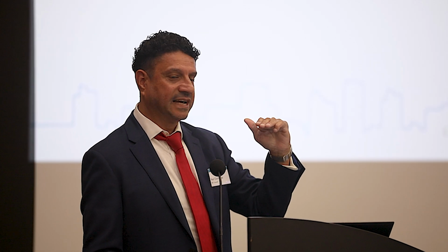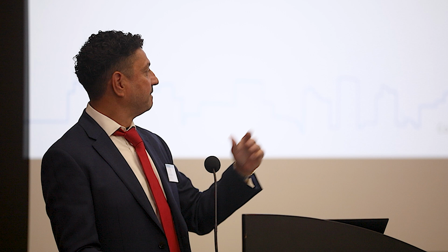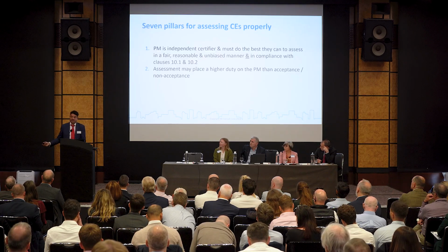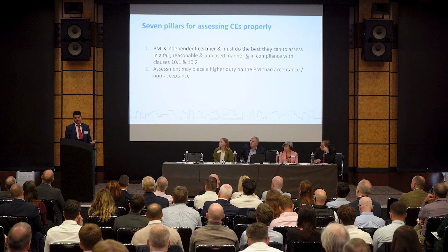And I think this is why it imposes a higher duty, because maybe had the project manager, in the unlikely event this ever happens, bitten the hand off the contractor and gone, oh yeah, I'll have some of that, I'll accept your quote first time round, no extension of time. Maybe that would have been fine. But it was the fact that he went on to make his own assessment that increased the bar maybe. Now you're not doing it right, because you have to do it fair and unbiased and in accordance with the contract. And the contract, which we clearly pointed out in adjudication, says you've got to assess time and money. And it increased the value by 50%. Anybody can see that's going to have an impact without even knowing the details.